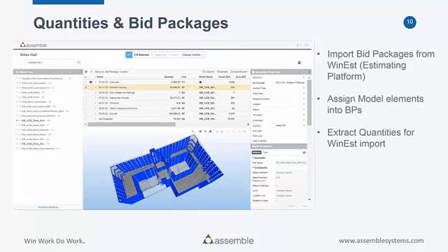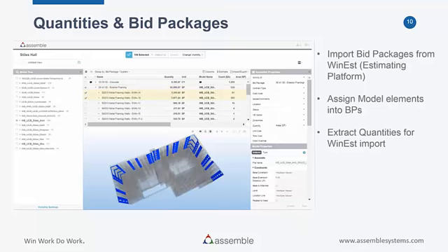So I guess the objective, the reason we do it, is that we try to make informative data and organize information in a way that means something to us and means something to our subcontractors. We group like objects into categories. I think that's the second screenshot right here. Now that I've got my bid packages, I can roll out that grouping, which had 64,000 square feet of wall, and I can understand now, okay, what is this bid package made out of?